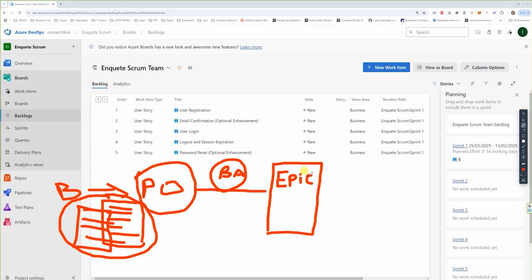you want to go on a holiday. You're traveling to Nigeria, right? And you have 4 children. So that's a big project. But in order for you to be efficient with project management, you have to take something big and learn to chop it into little bits. So you take, I want to travel to Nigeria, and you break it down into what you call epics, which is make it a little bit smaller, but not too small.